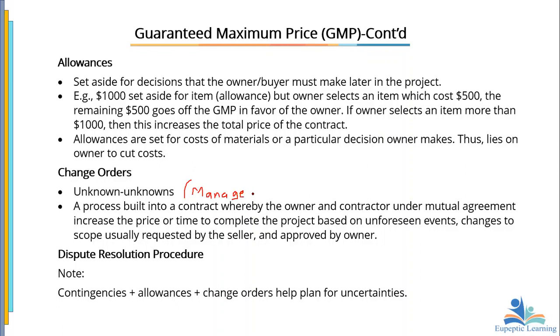But for the contingency reserve, it has been allocated for that purpose. So when it comes in, you need to use it. There's no need to go and ask permission. The fact is that it has been placed there for it. So all you need to do is to document that this is what happened and it was used. But for the management reserve, a change order needs to be issued by the contractor. If the owner or the sponsor agrees, then he may use the management reserve.